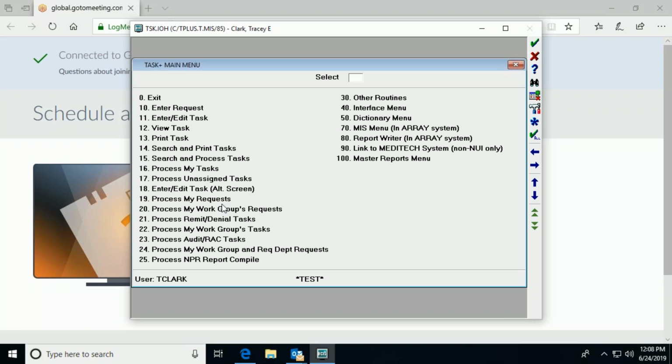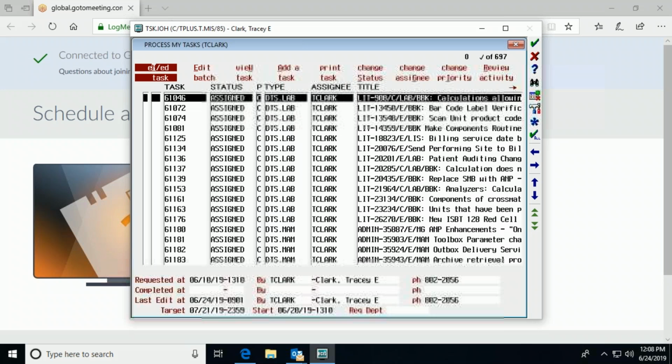So I would advise you to get those customs and even create a task for every custom so it gets tested. And you could even create a task type called custom, and get those in there, get them assigned to the people that should be testing them, and make sure. And I could be preaching to the choir here. I just want to mention that.